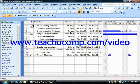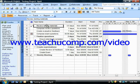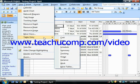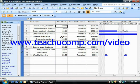To do this, just click into the table part of the view, and then select View from the menu bar, roll down to Table, and then choose Cost from the side menu that appears. That'll display much of the cost data that you need to view for the various project tasks.